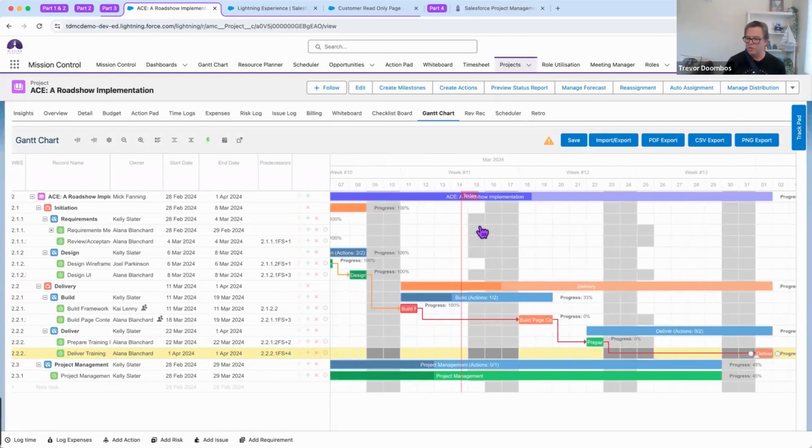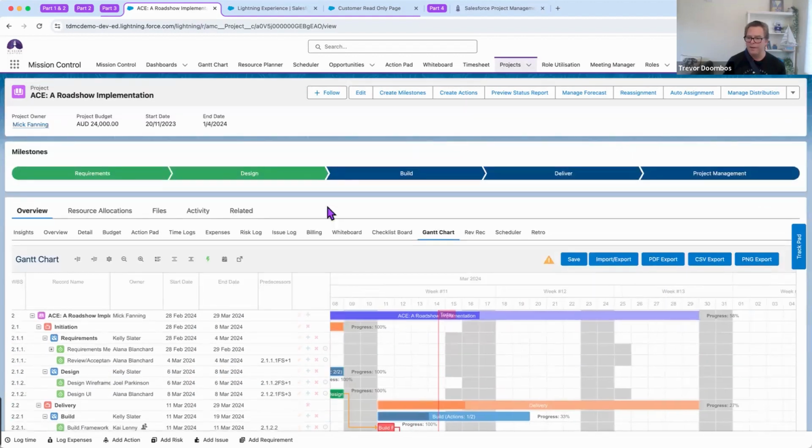You may notice little grayed out areas. This is showing where people assigned to this project are not available. So they're actually on annual leave, holiday, PTO, what have you. So if you try to actually move, say this over when that person's not available, it'll actually push that out. And what if you want to get that information?